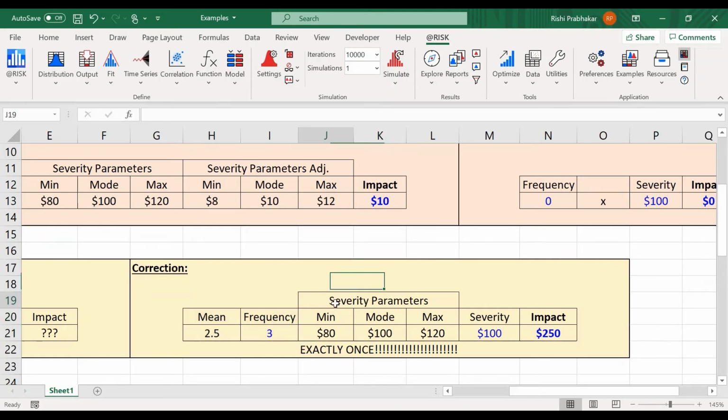So I've created a distribution of the severity or consequence of this event if it occurs once. So each time it happens, it will or should actually be a sample from this distribution. And for however many times it happens, I need to sample that many times and add them up.